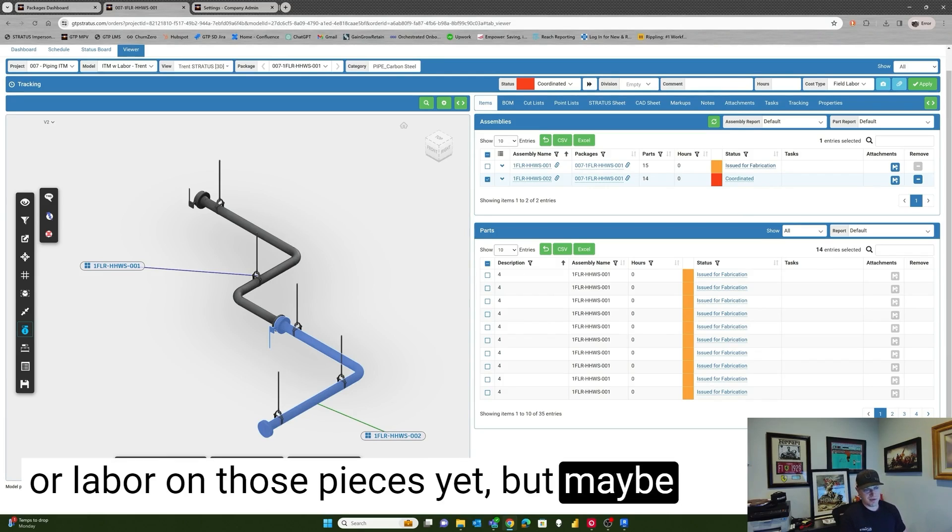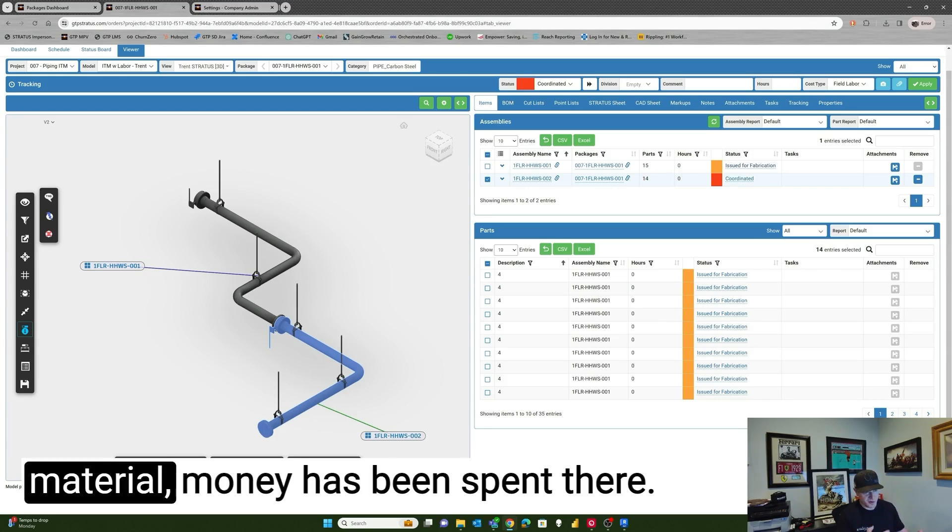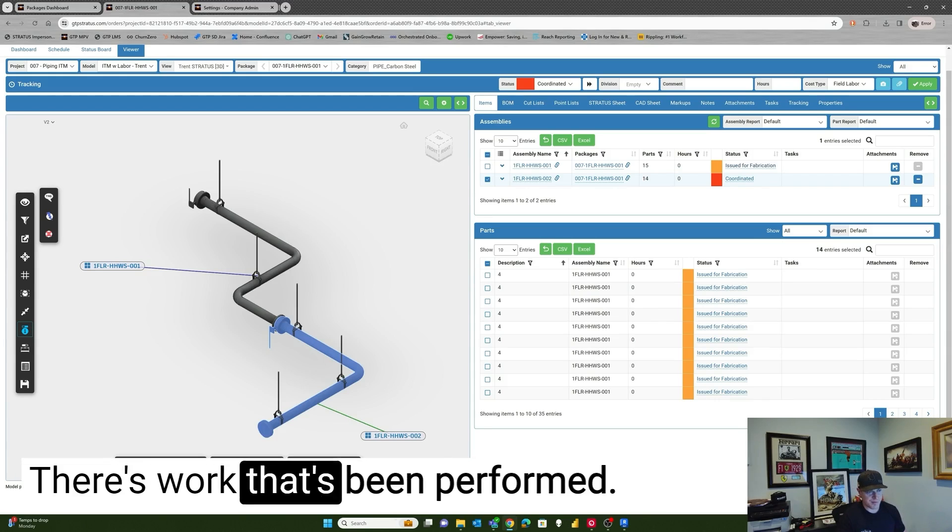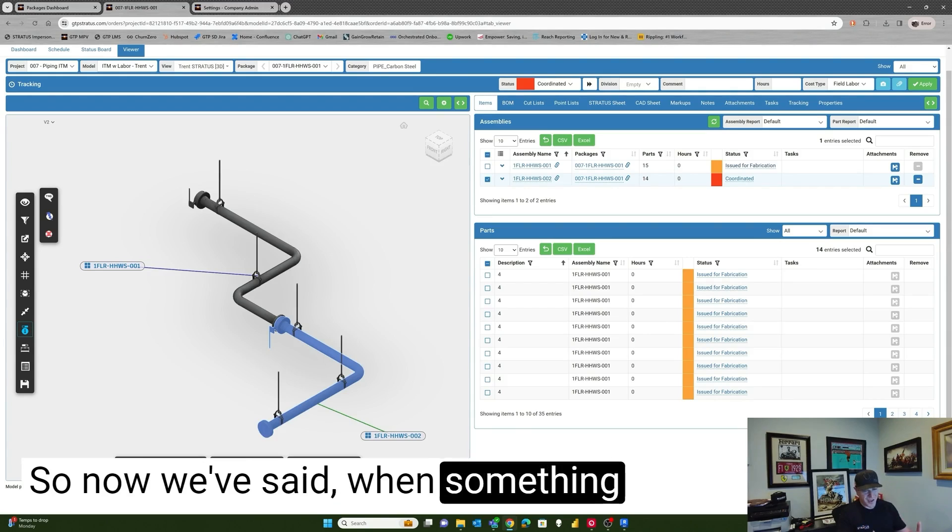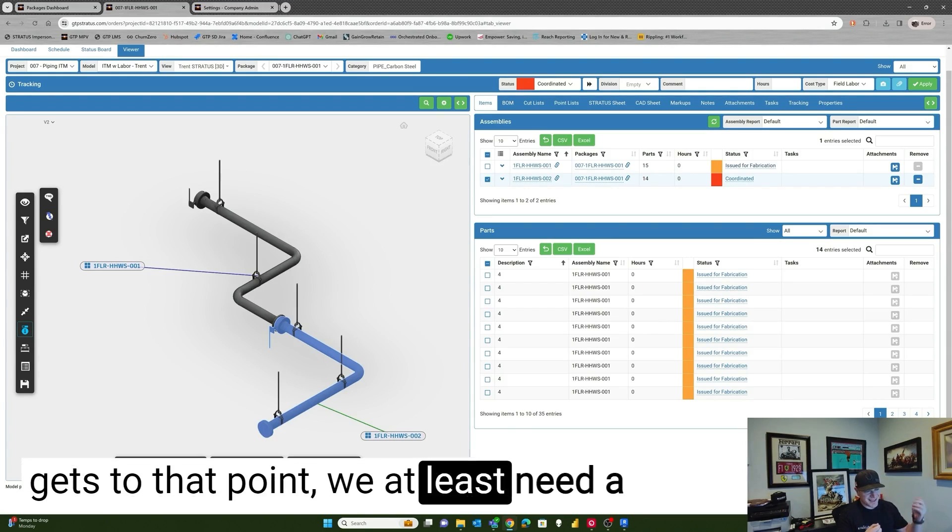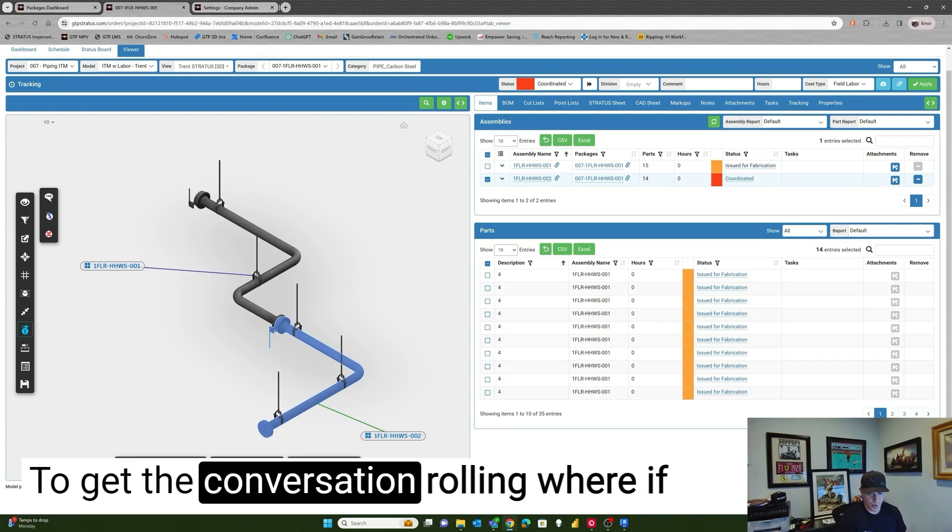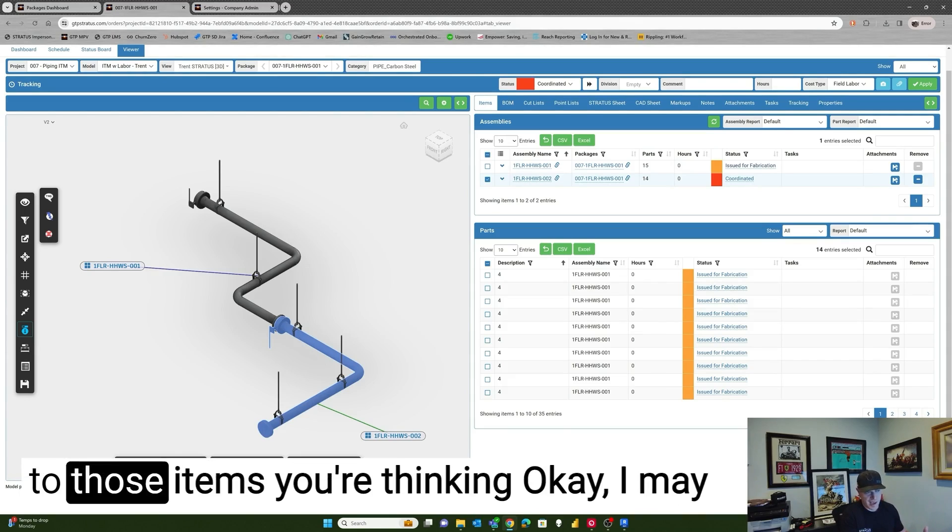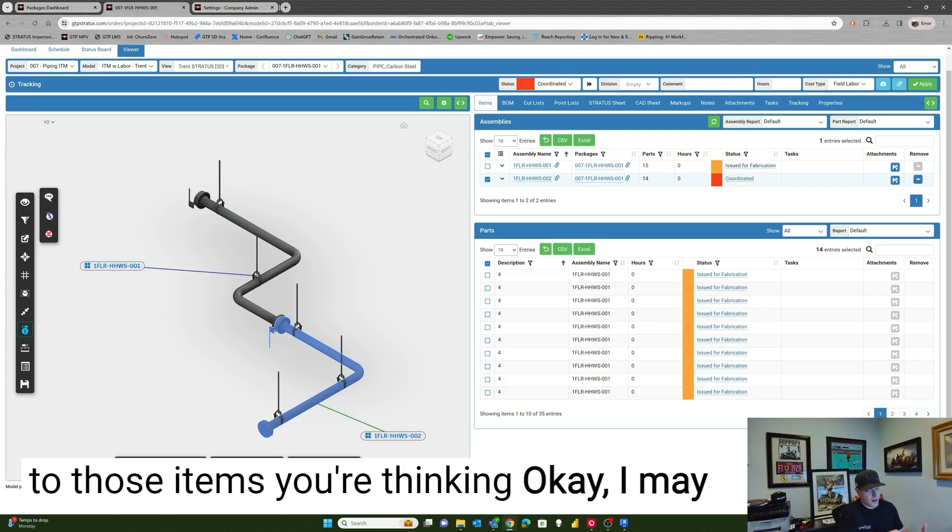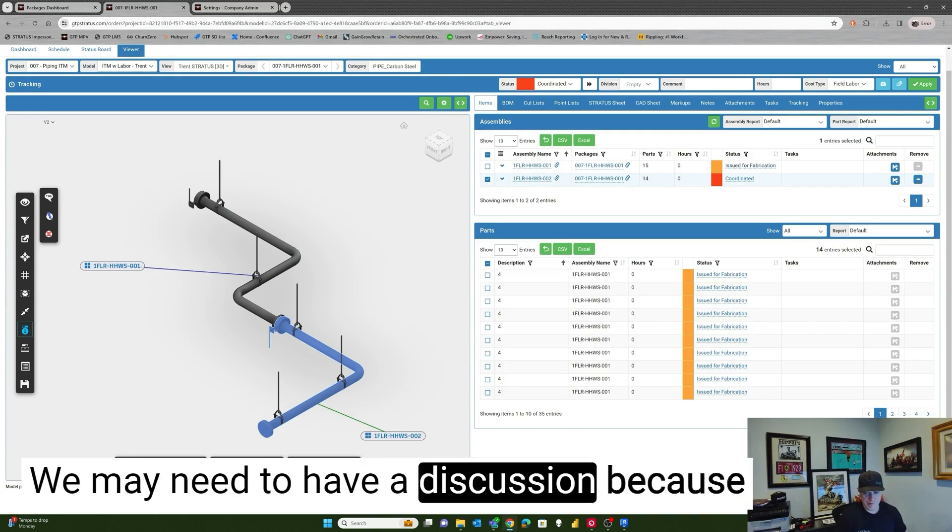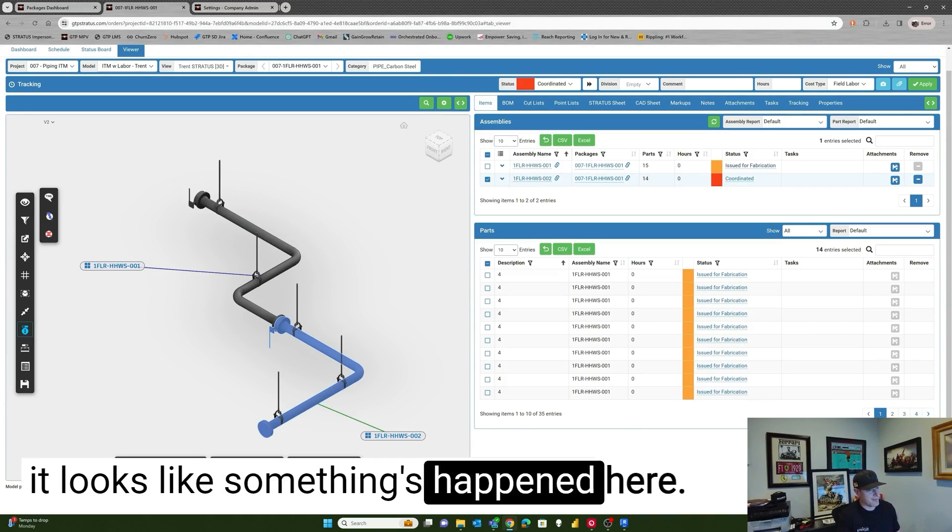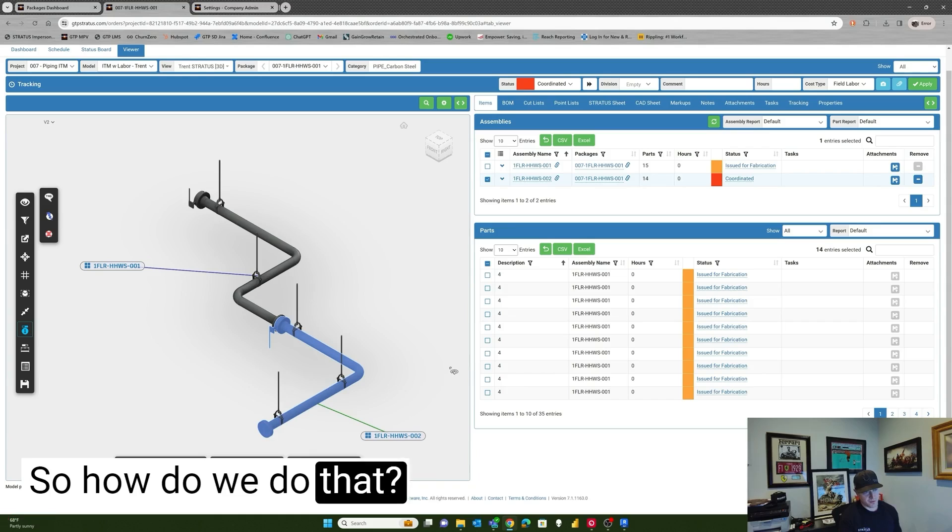But maybe issued for fab means maybe I've procured material, money has been spent. There's work that's been performed. So now we've said, when something gets to that point, we at least need a light bulb or a ding or something to get the conversation rolling where if somebody does want to make changes to those items, they're thinking, okay, I may need to reach out to my project manager, we may need to have a discussion because it looks like something's happened here. So how do we do that?